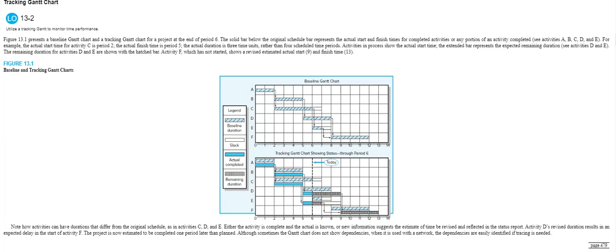One of the biggest problems that project teams face is apparently small changes sneaking into the project schedule or project budget or project scope that were not properly considered. Setting the baseline helps avoid this because it just puts everyone on notice that nothing is going to be done that exceeds this baseline.